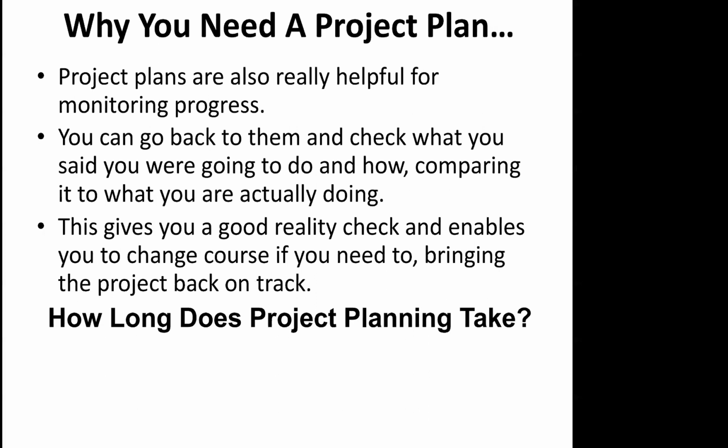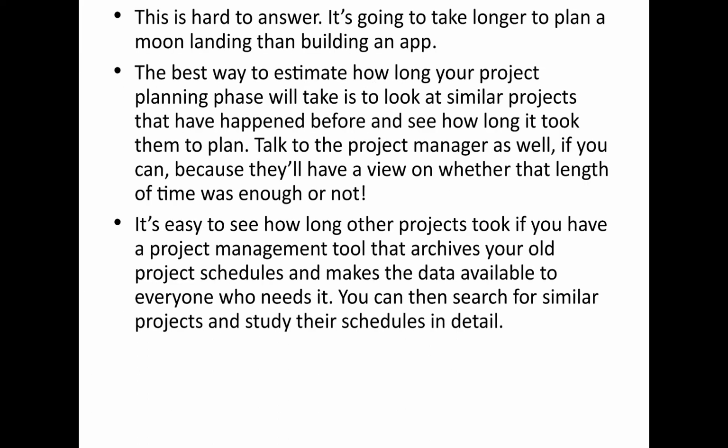It's a hard answer, right? Because it's going to take longer to plan a moon landing than building an app. So the best way to estimate how long your project planning phase will take is to look at similar projects that have been planned before and see how long they took to plan them. Talk to the project managers as well if you can, because they will have a view on whether that length of time was enough or not enough.